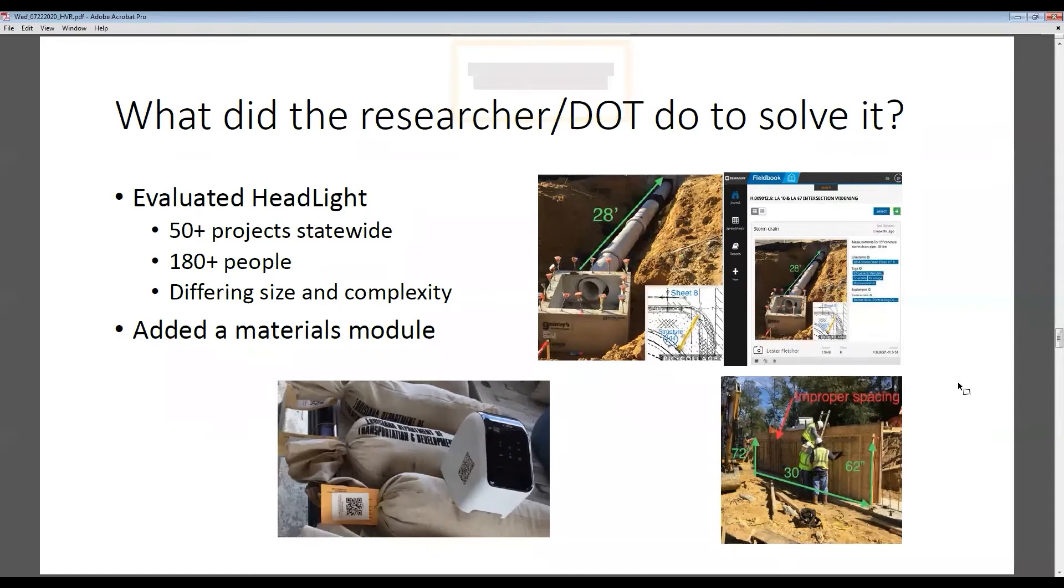You can see some of the different types of observations we have. If you look at the first figure on the right with the pipe and the box cover, we extended and widened the radius for this project. We were able to use pic collage and show the exact location. All of these pictures and videos attached in this field book program from Headlight are geo-located with latitude, longitude, and elevation, and they're time and date stamped. All of that is now part of that construction documentation.